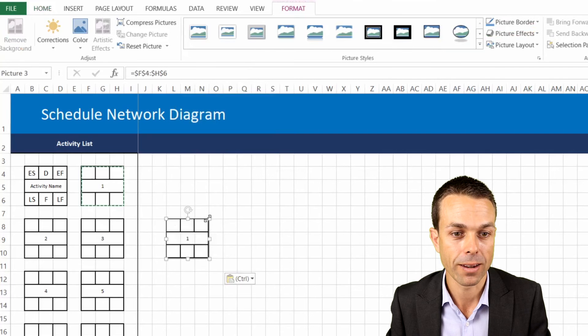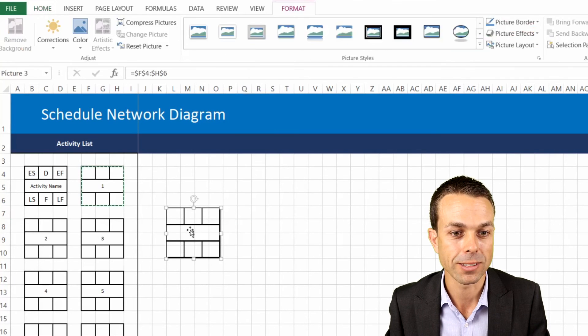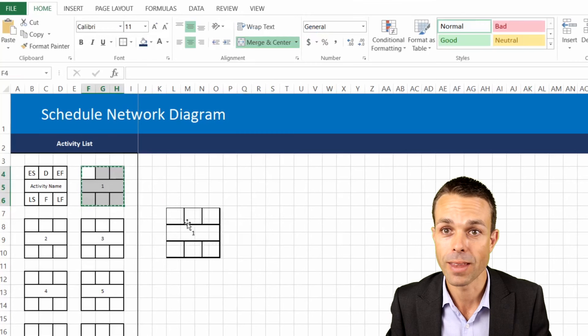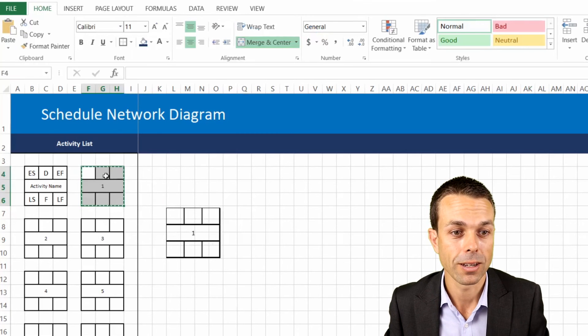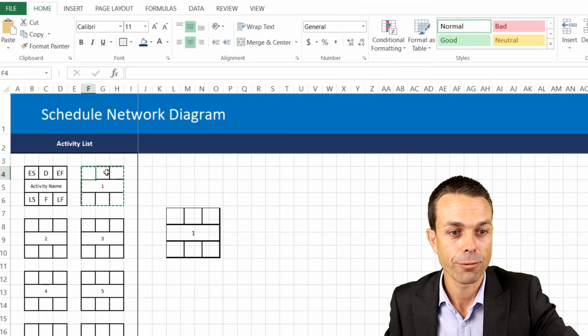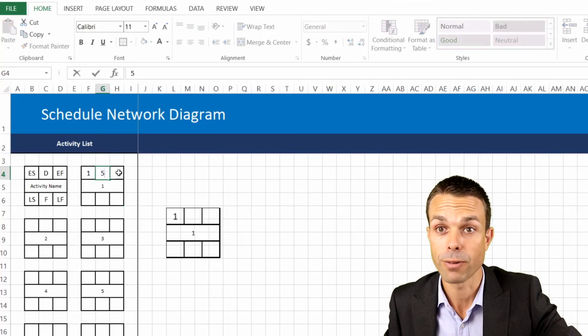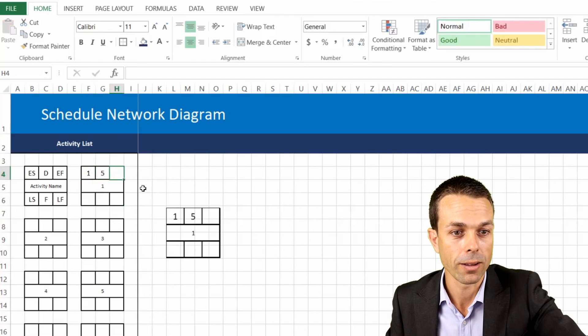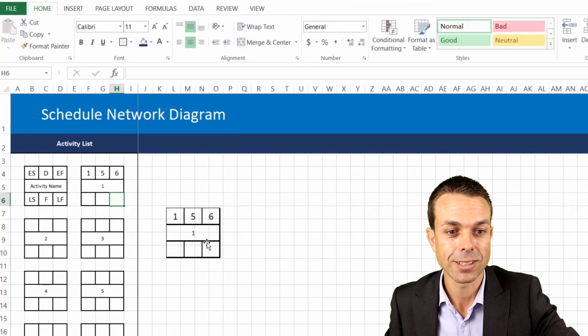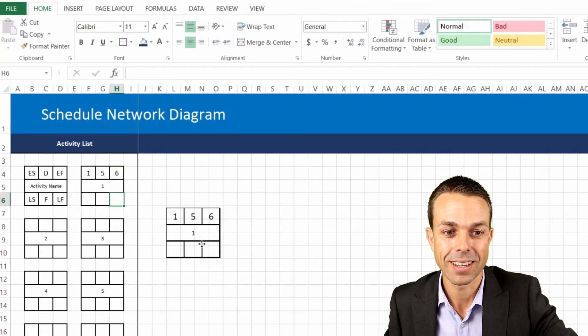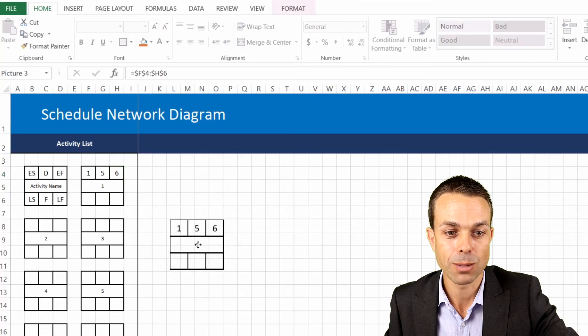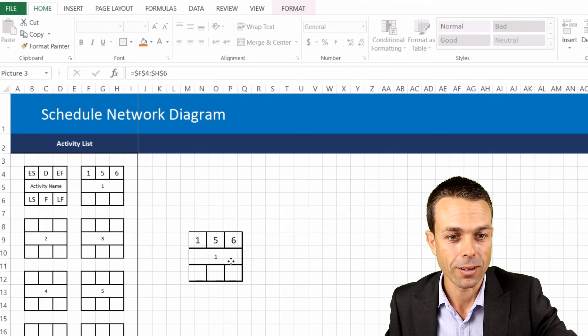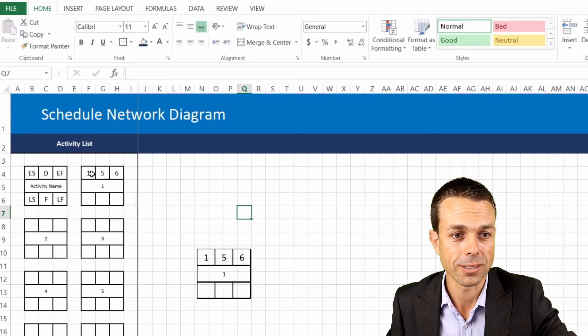I'll just give you a little example of that and we'll make it a little bit bigger just so we can see it quite nicely. If I double click on that picture it takes us straight to our activity list over here. And if we put something in here and then we put our duration maybe five days, so we've got our early finish of six days. As you can see it appears in our item over here and we can actually move this around.